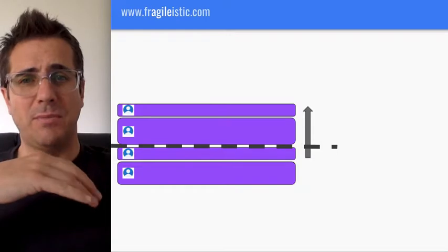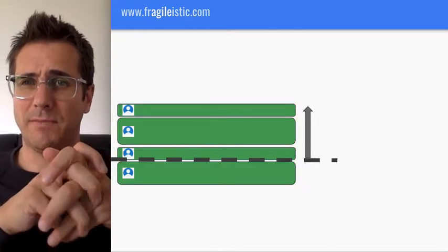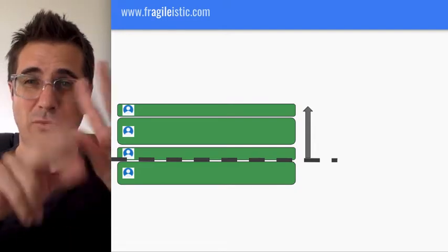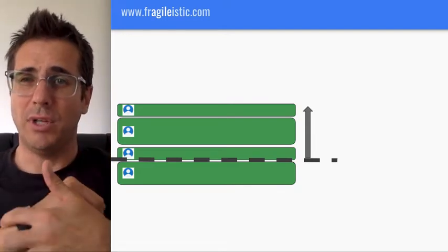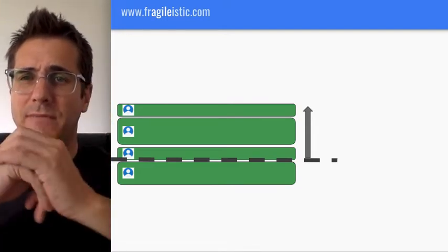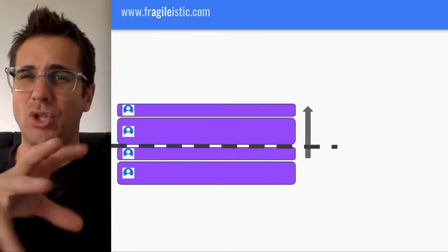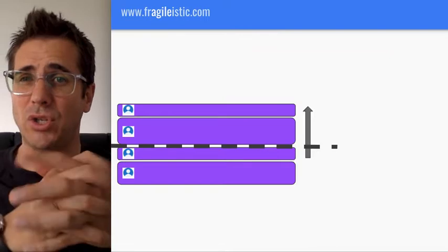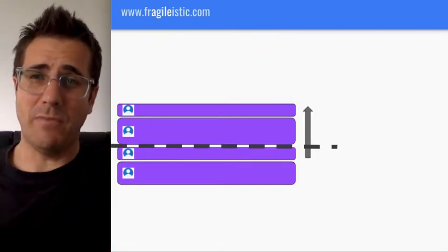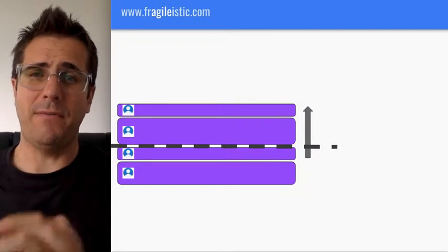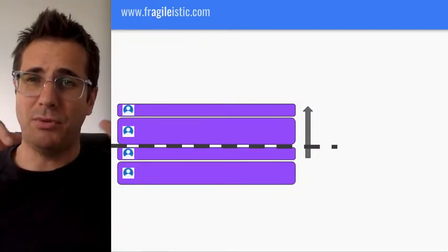Now, what the difference is between those two is if you're planning user stories, you're really planning them into a sprint, things that can be delivered in a sprint. So that's normally 2 weeks. So it's a small increment you're going to deliver towards the feature, which is the bigger thing. As opposed to if you're planning features, you're really saying, well, these are the features that we're going to plan in this increment, this planning increment, normally 12 weeks. So you're looking at a SAFe framework there. But the principles are exactly the same.